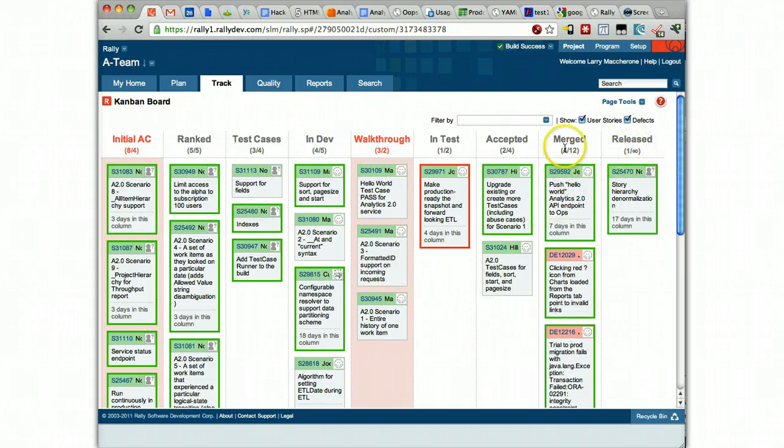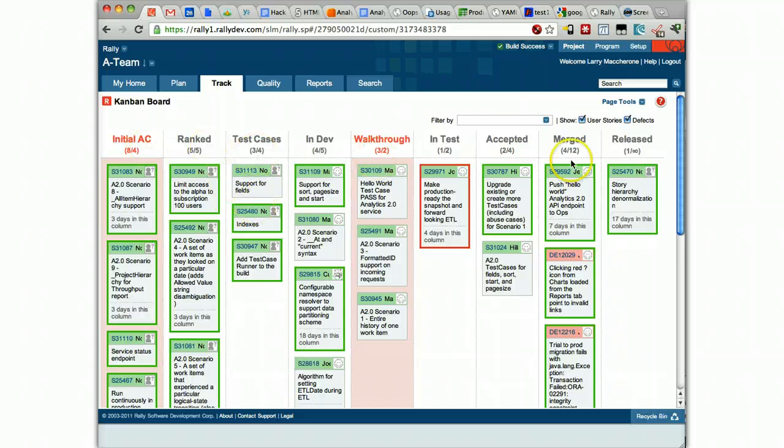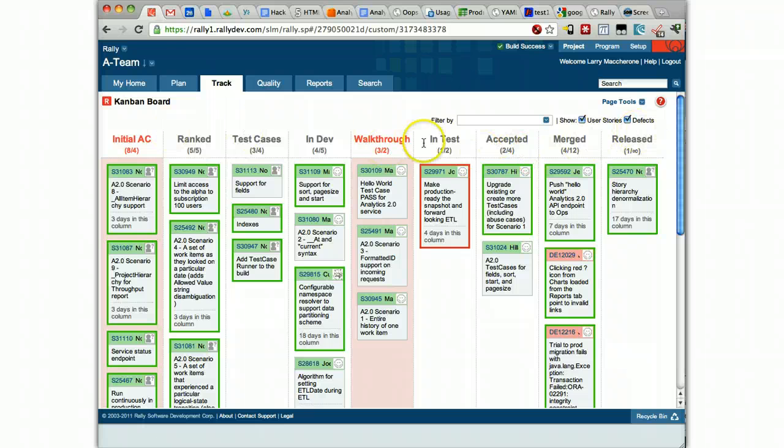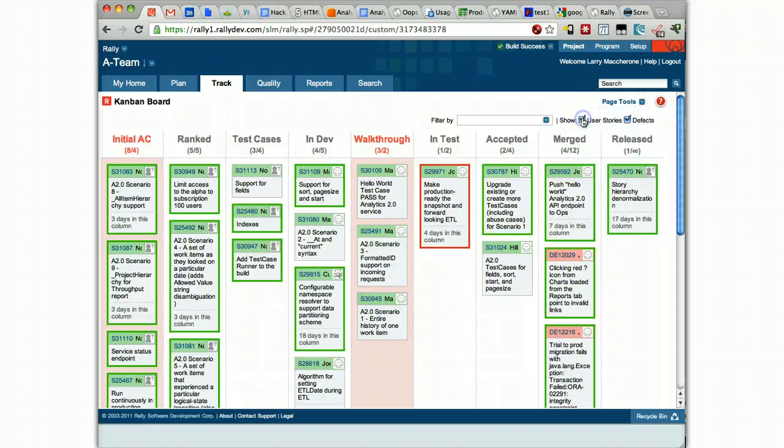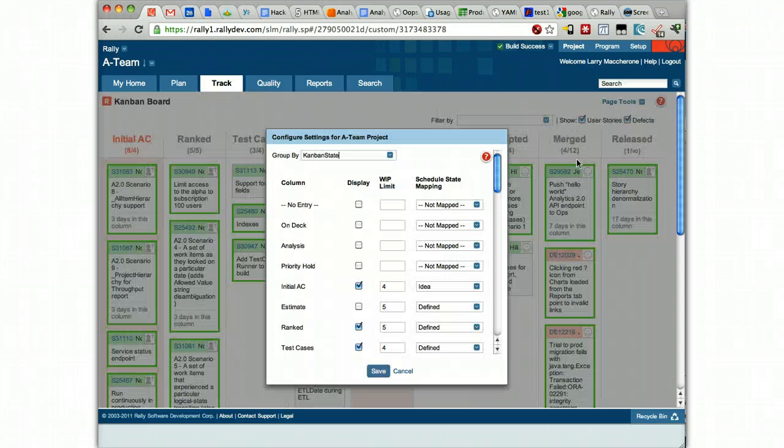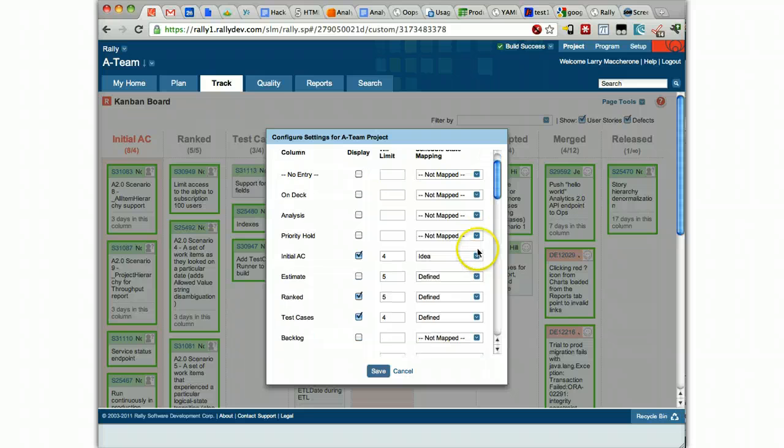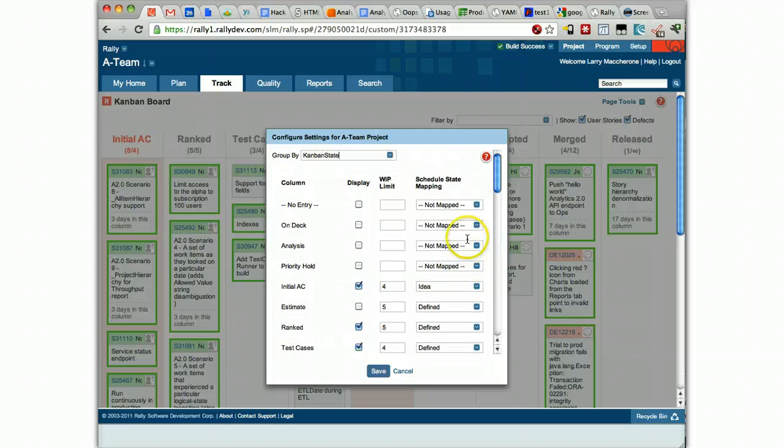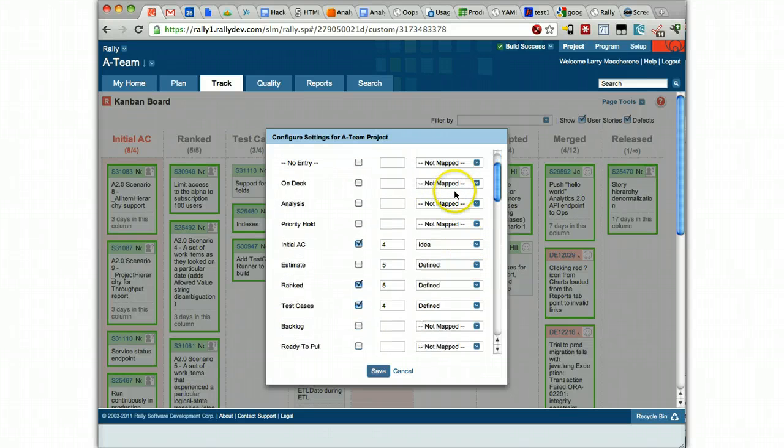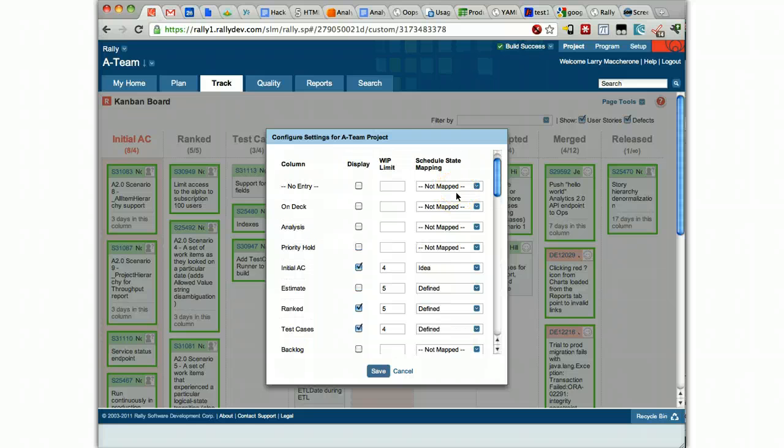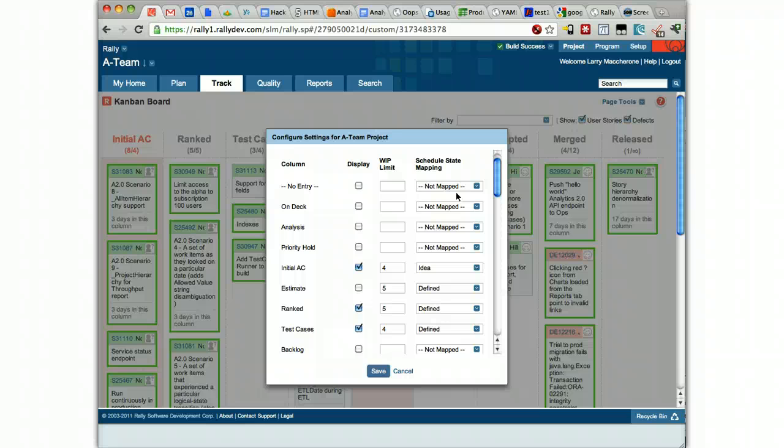There's these columns, these Kanban states that are supported, and the team got to decide that. So you can have a different Kanban definition per team or sub-team. You set that, you create that in this settings panel here in Rally. We also have this canonical mapping to this schedule state field. So that when you want to roll up state, you want to look at it at a higher level, each team can have their own Kanban definition, their own Kanban board, but you can still get a macro view of what's going on.